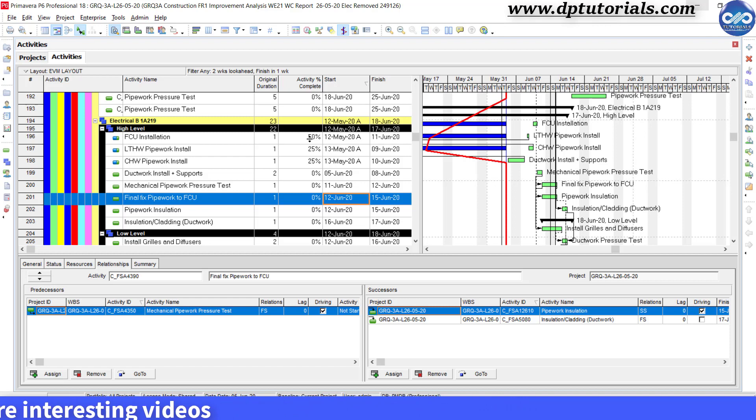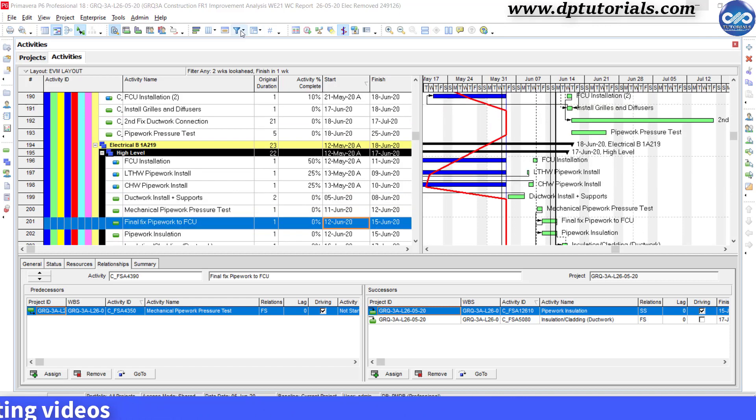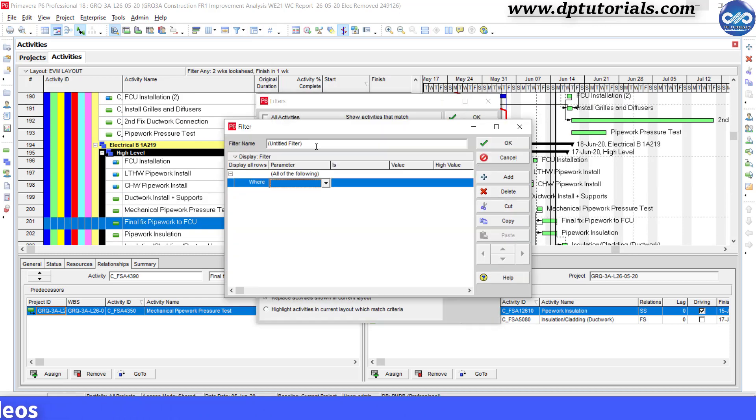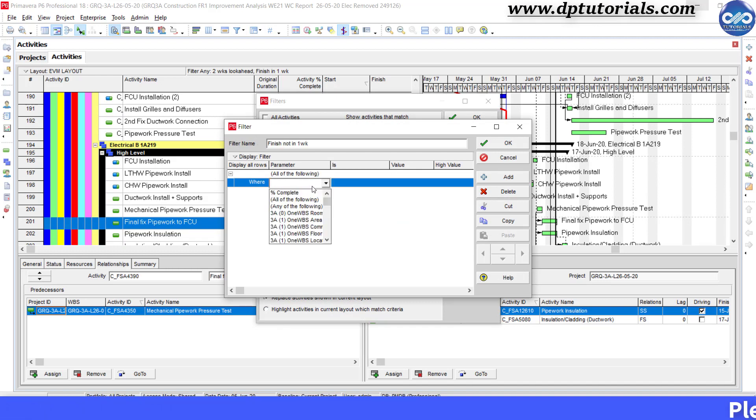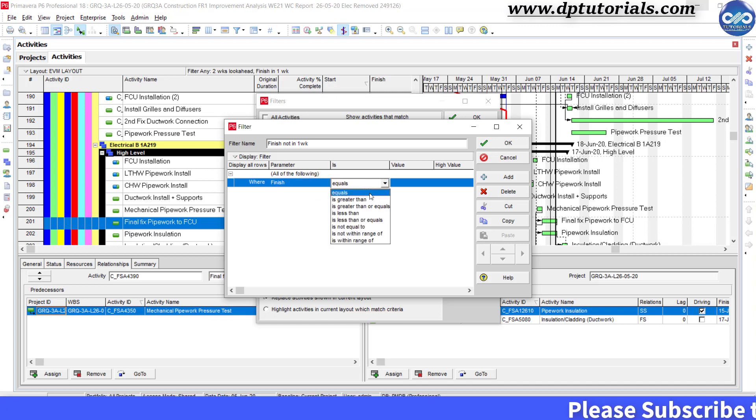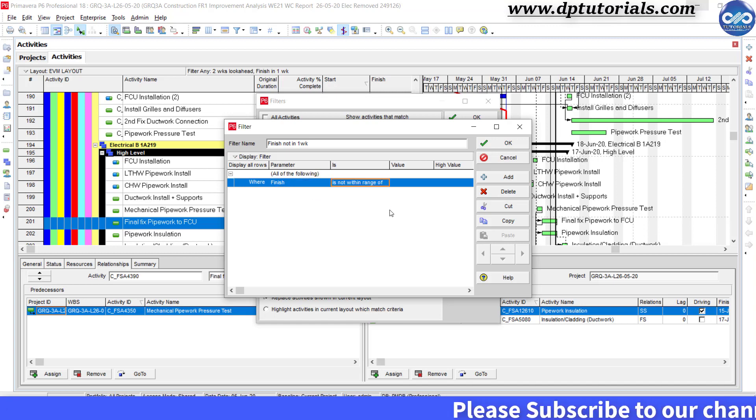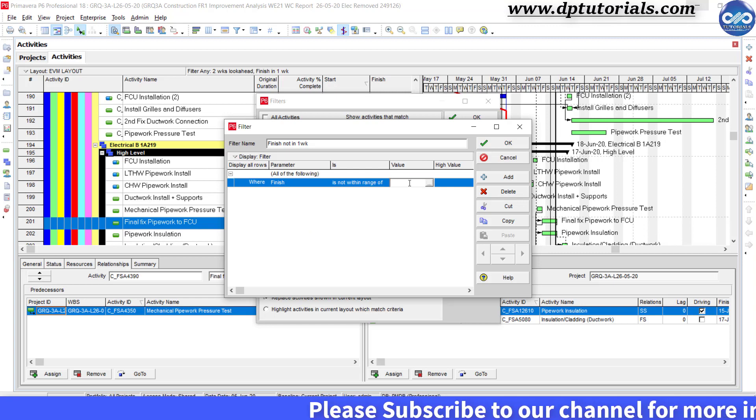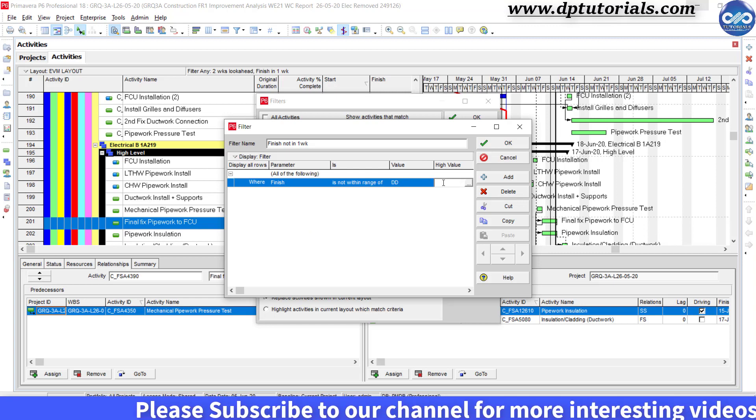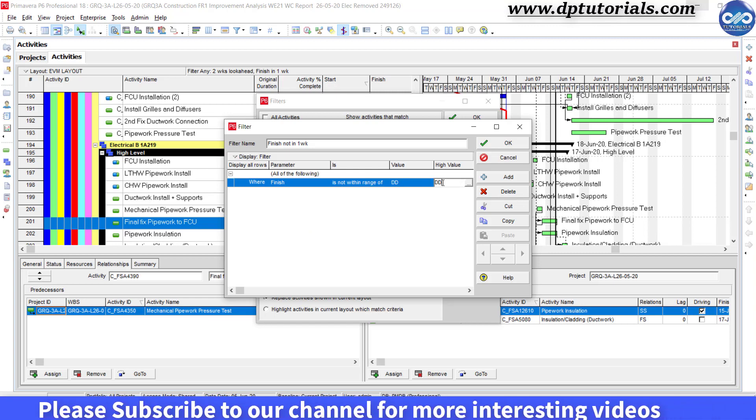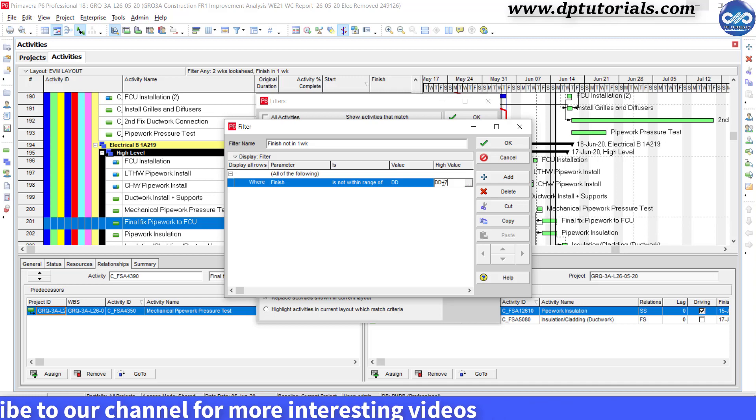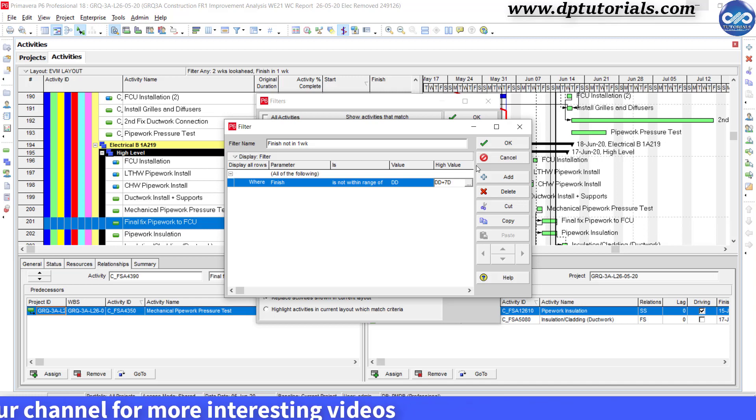Click on the filter icon, click new, and give condition as finish not within range of DD and DD plus 7 days. Now click OK.